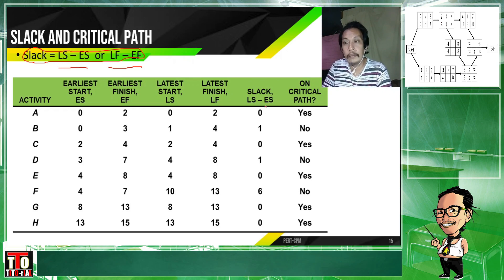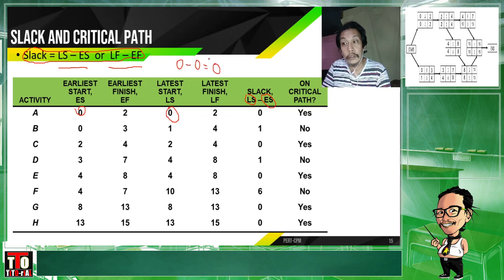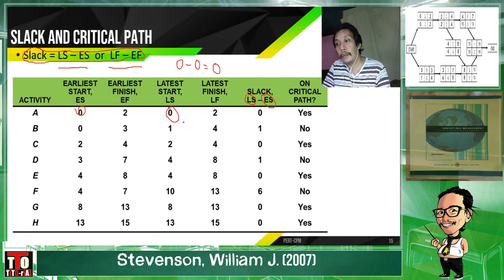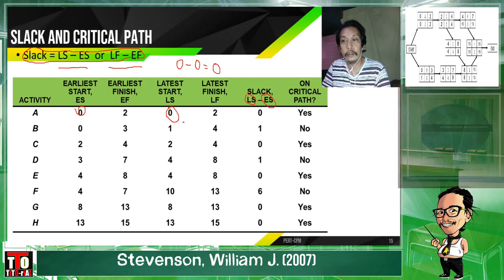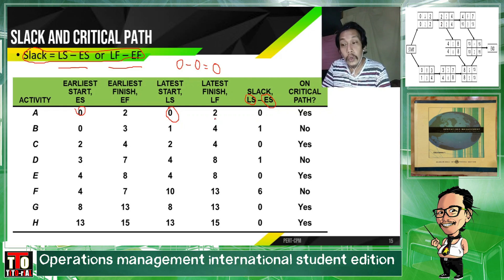In my example, I'm using LS minus ES. Okay? LS is 0 minus ES of 0 equals 0. Latest start is 0, earliest start is 0, so 0 minus 0 is definitely 0. Now, try using latest finish (LF) minus earliest finish (EF). Looking at the values: you have 2 minus 2.